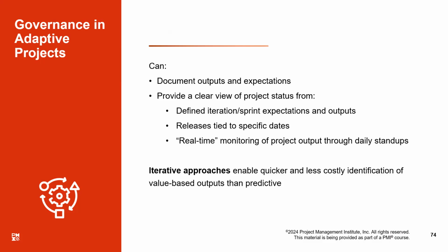To make things easier for you, if 10 Scrum Masters are reporting to the next higher level, let us put it a simple name. We call that person a senior Scrum Master. That is the next higher level. And if there are multiple senior Scrum Masters, they might be reporting to another higher level, which we may call a chief Scrum Master. Similarly, for all the product owners, we will have a senior product owner at the next level and a senior or chief product owner at the top level.